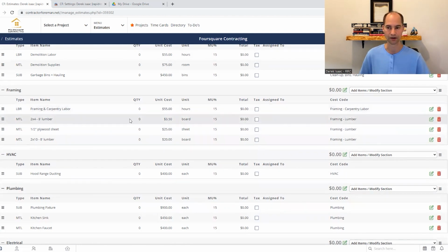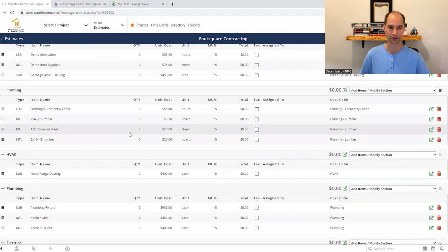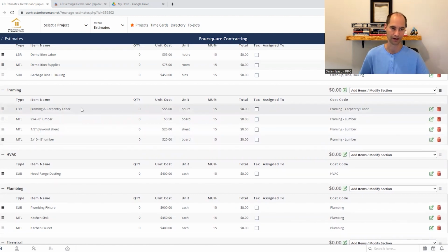So break things out and have more detail for your labor hours as a way to increase accuracy and have a well built out scope of work, because the clients can see this is one thing, this is another thing, this is what we're doing, not just framing a new kitchen as per plan. That tells them what you're doing, but it's not really descriptive of what's getting done. And it opens up that gray area where the client later is like, well, I thought you were going to be framing tray ceilings throughout the hallway as well.